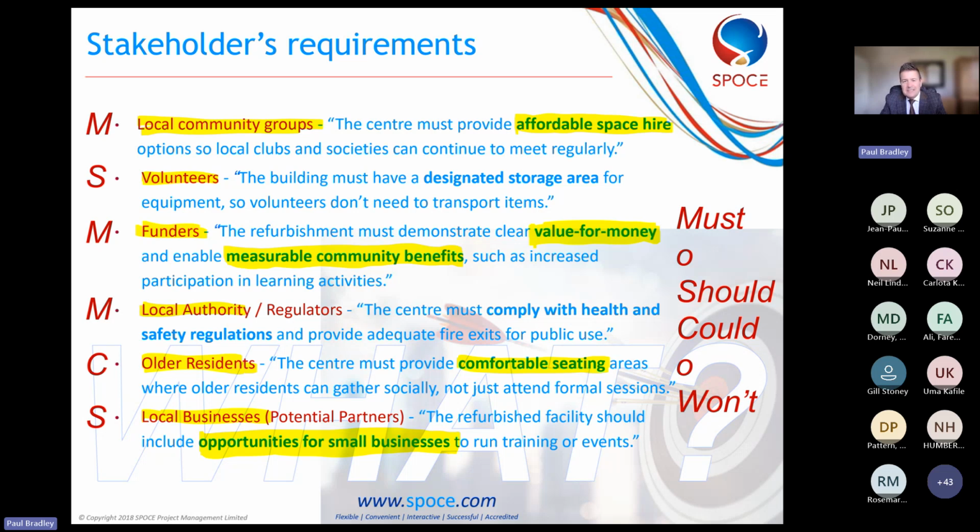When prioritising these types of requirements for any development cycle that you might be undertaking, typically you would not have more than 60% must-haves, and the reason for that is because you need to leave yourself a 40% headroom to guarantee delivering the must-haves. Okay, so typically you would not aim to have more than 60% of musts.